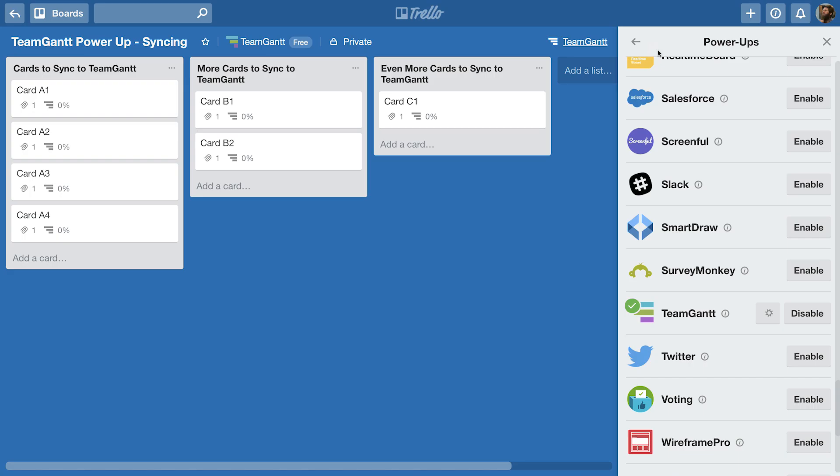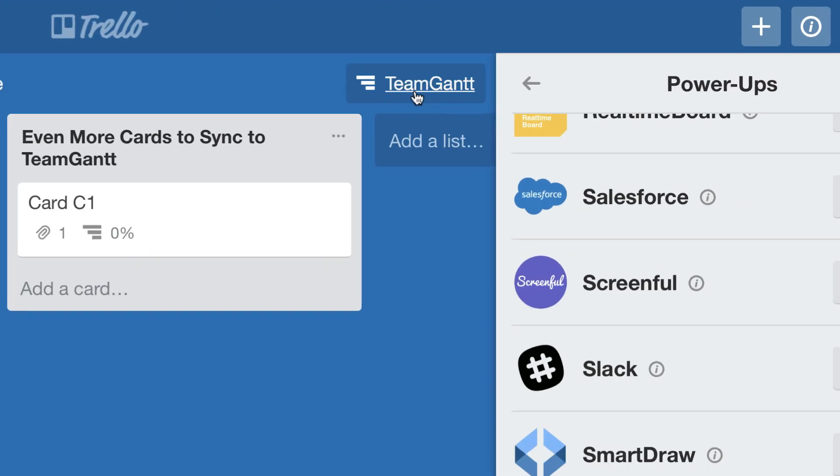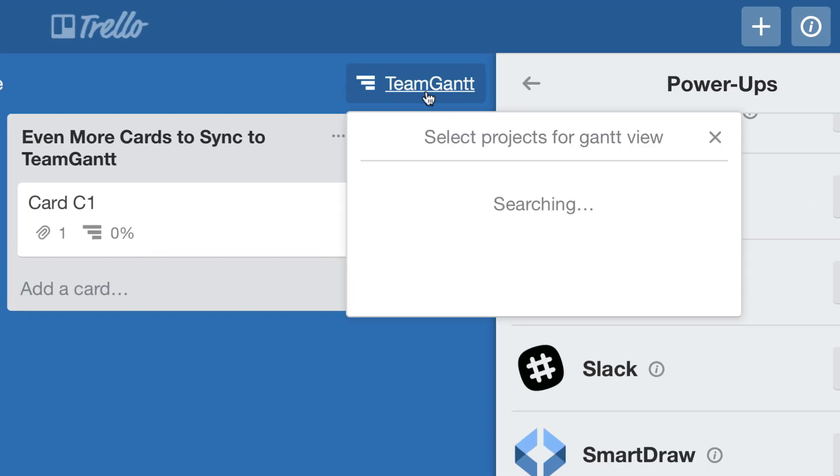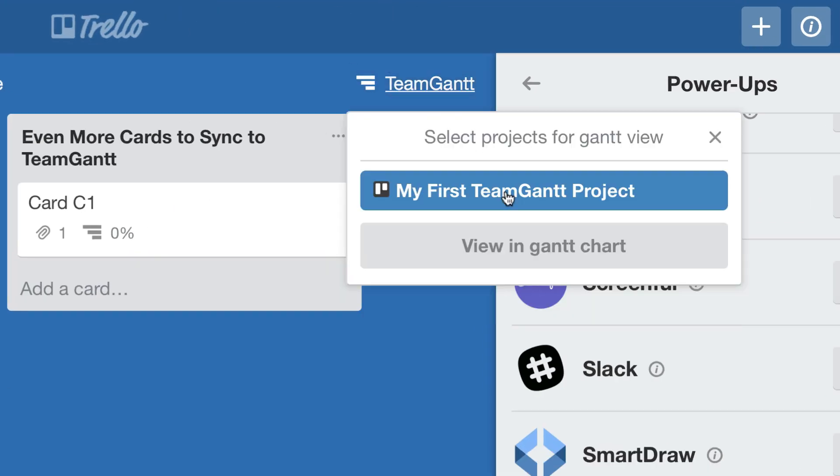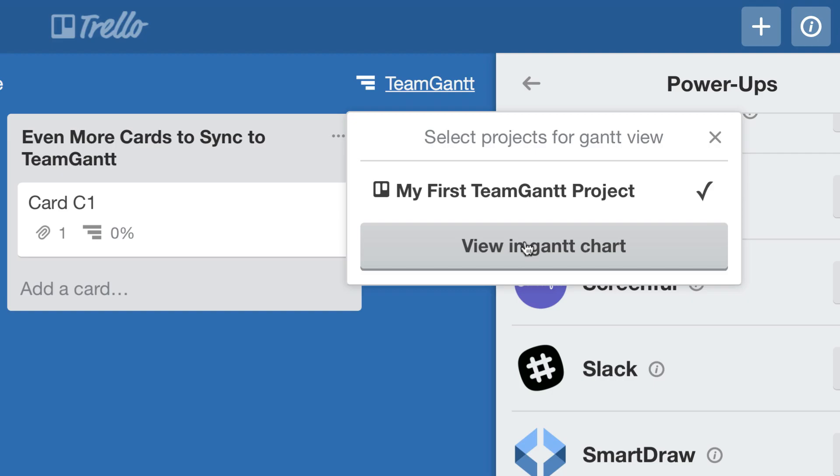Click the TeamGantt link in the top right corner of your Trello board. Select the projects you want to see in a Gantt chart and click View in Gantt chart.